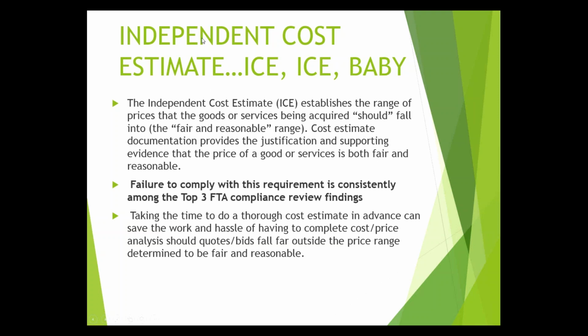This lack of an ICE is in the top 3 FTA compliance review findings consistently. It's one that is just often overlooked. And sometimes it's not overlooked, but back to the example I used earlier, someone will say, well, I talked to this person, and I talked to that person, and I looked it up online, and then I called the system next door, because they had just purchased one. The important thing here is this all needs to be written down and documented. It doesn't need to be a huge report. It doesn't need to be an essay.